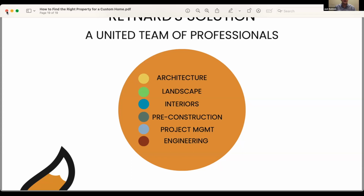And when they come to us, $200,000 is kind of on the low end of what's possible for a livable single family home, because custom prices tend to be on the higher end. Again, I am not typically quoting these building costs. That's when you talk to a general contractor or a builder. That person is going to give you their quote to build the home, but only after they have plans and specs, just like a construction loan. They need plans and specs to give you a really good quote. And if they haven't got plans and specs and they're just shooting from the hip, to me, that'd be a little bit of a red flag.